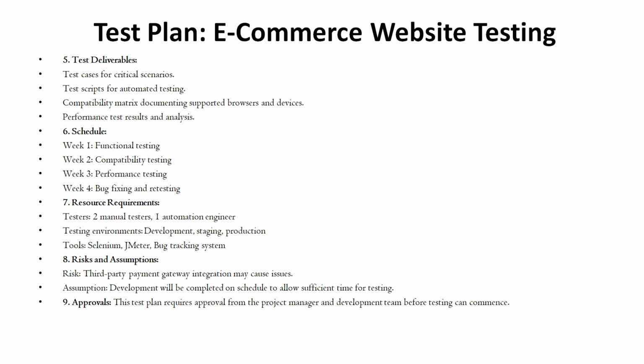On top of it, there are other fields, like the entry criteria. Entry criteria is nothing but when will you begin the testing. That's the entry criteria. And there is another field called exit criteria that says when will you finish the testing. And then how you are going to handle the test report and approval, so all those things related to the plan. All of these will be covered in the test plan.